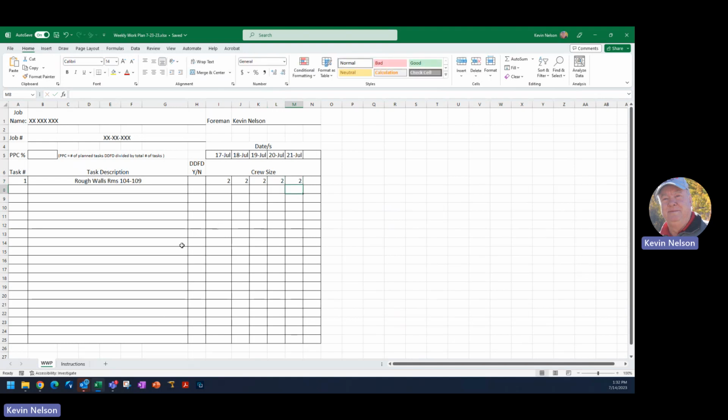All right. Well, I've got more than two people on my project, so I've got to find some more available work. Available work means its predecessor activity is done, and I have all of the material on site to start that task. So back to our plans we go.